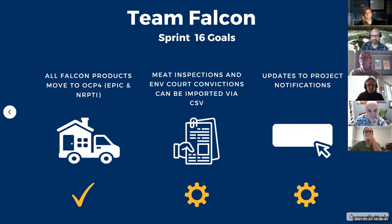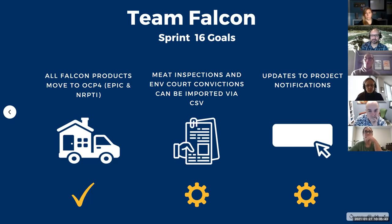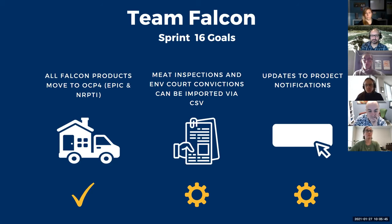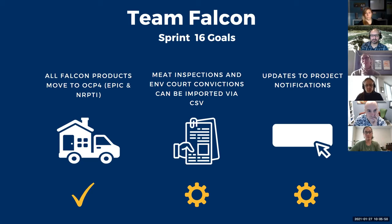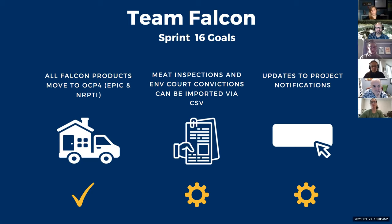Alright. So our sprint goals, this last sprint, we wanted to move all of our products to OpenShift 4, which we did. So we moved Epic, NRPTI, LNG, NERCID, BCMI. Everything is now at OpenShift 4, which is awesome.